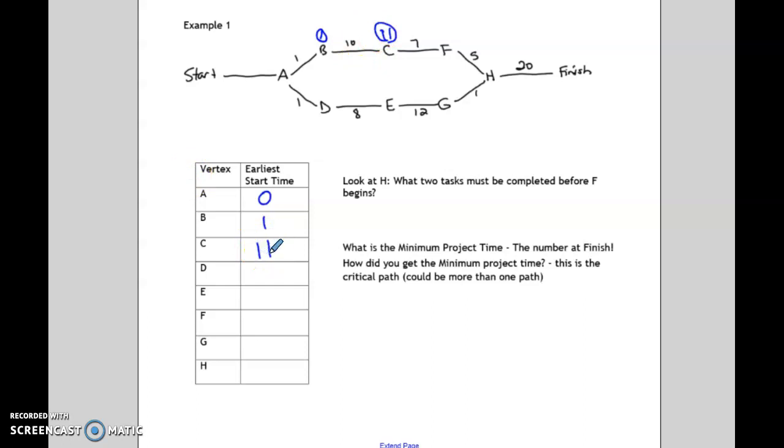Okay, we're going to keep going with the hamburger path, even though it jumps to letter F. So after you defrost the hamburger, then we're going to brown the hamburger. That will take 7 minutes. So before I ever add the sauce, I will already have spent 18 minutes. So come down to F. Before we can start F, the earliest start time for F is at the 18-minute mark.